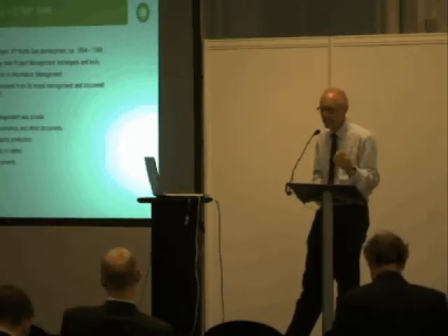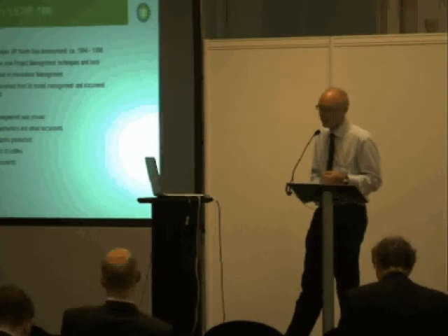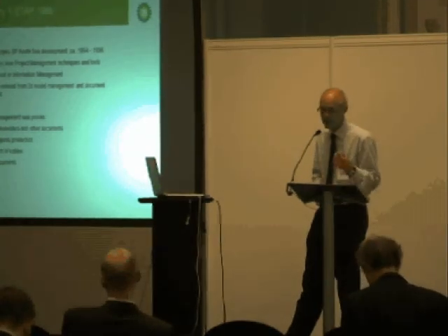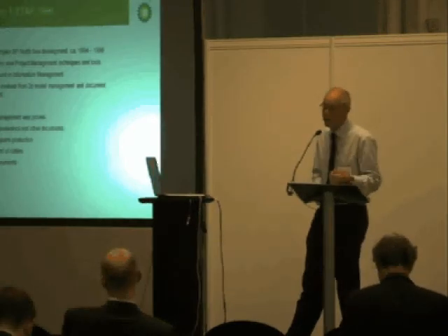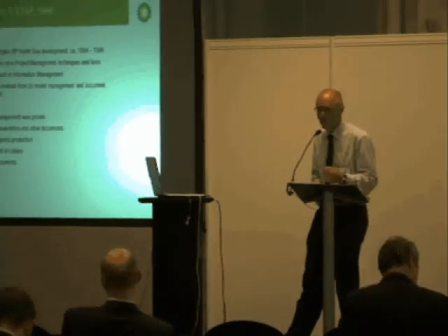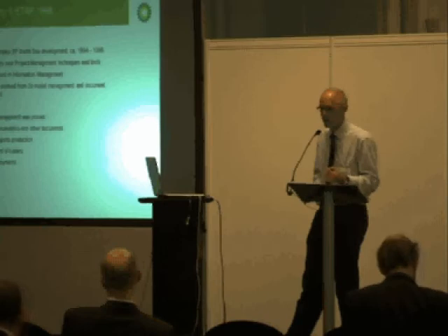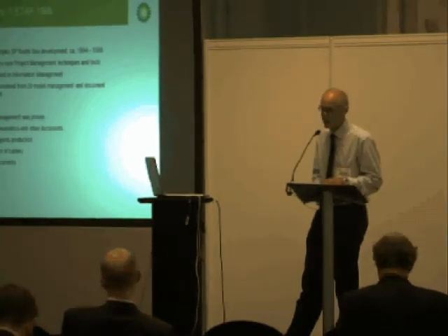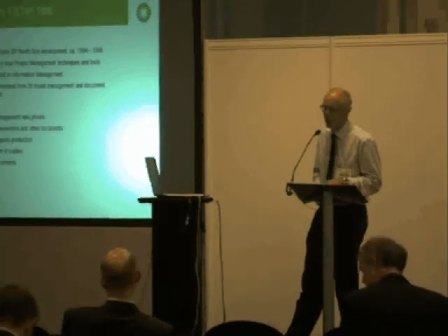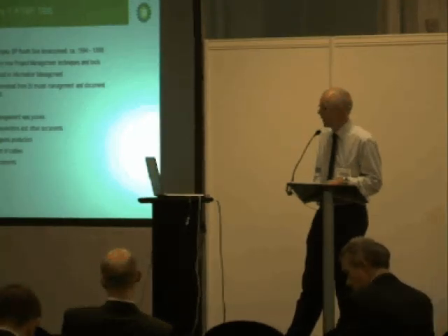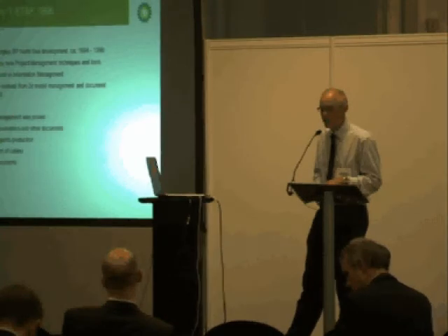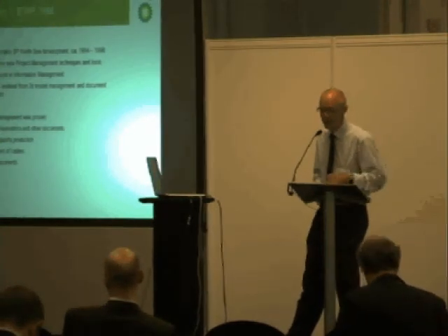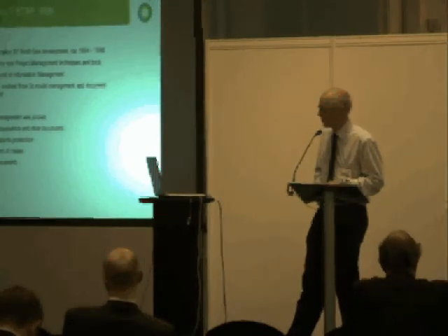We used it to focus the delivery of piping isometrics for construction. And other documents. We use it to focus the delivery of service supports, pipe supports, very boring things, awful lot of them, and they're right on the project critical path. And we're trying to really improve that performance, which actually overall improves the performance of the project. Things like the management of cables as well, and holes in walls, they're a very big challenge. And also the expediting and use of it to get supplier documents out. We have a very large supplier network which we have to deal with on our major projects.